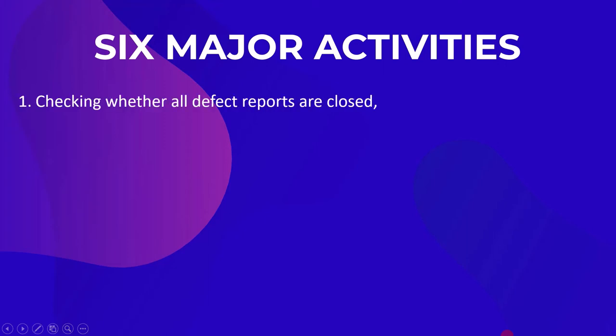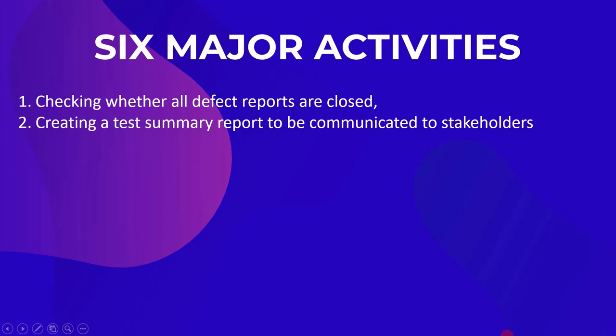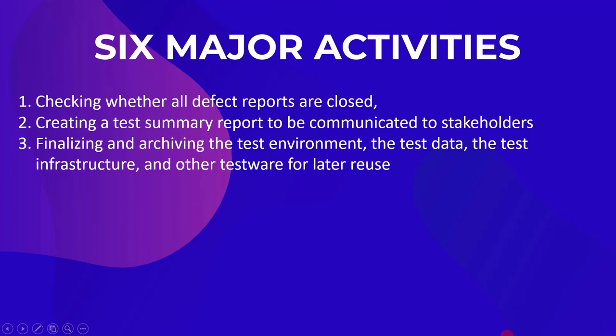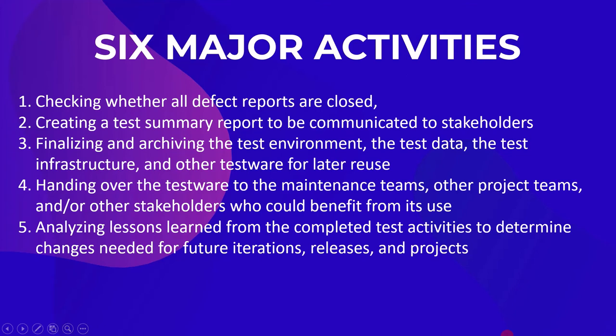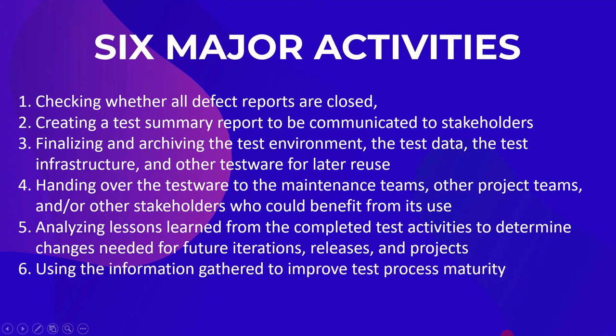The first activity is checking whether all defect reports are closed. The second activity is creating a test summary report to be communicated to stakeholders. The third activity is finalizing and archiving the test environment, the test data, the test infrastructure, and other testware for later reuse. The fourth activity is handing over the testware to the maintenance teams, other project teams, and other stakeholders who could benefit from its use. The fifth activity is analyzing lessons learned from the completed test activities to determine changes needed for future iterations, releases, and projects. The sixth activity is using the information gathered to improve test process maturity.